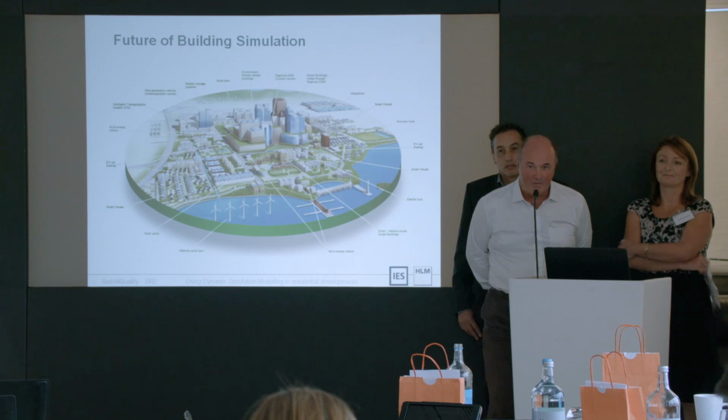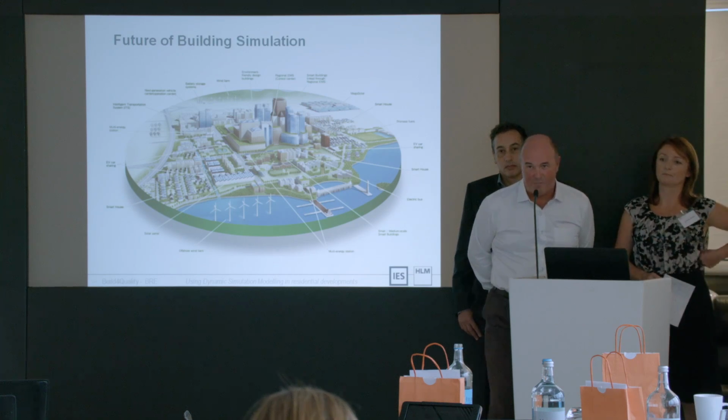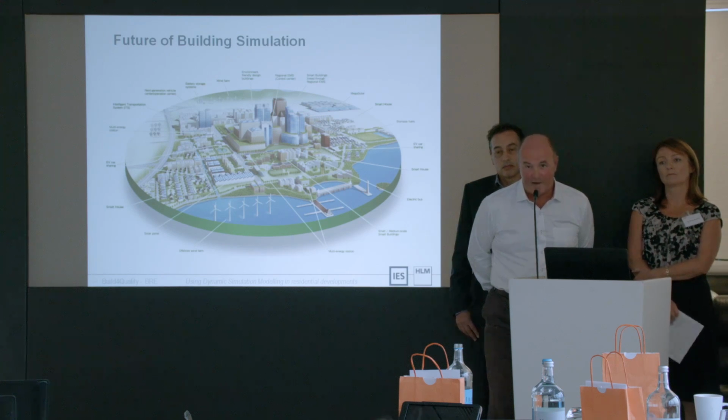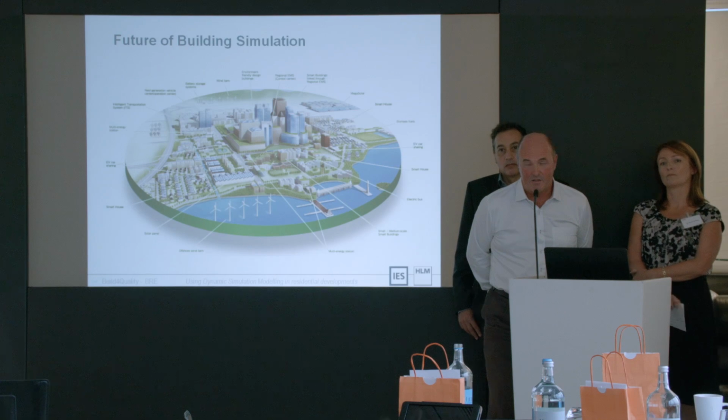It's going to be in the region of 350 to 400 pounds a square foot, but that's because it's all tenure blind and it's a very, very high cost per square metre. Times that by 10.7614 or 764, so £3,000 to £4,000 a square metre. So the cost of the energy saving specification is absolutely minute compared to the construction cost of the project.